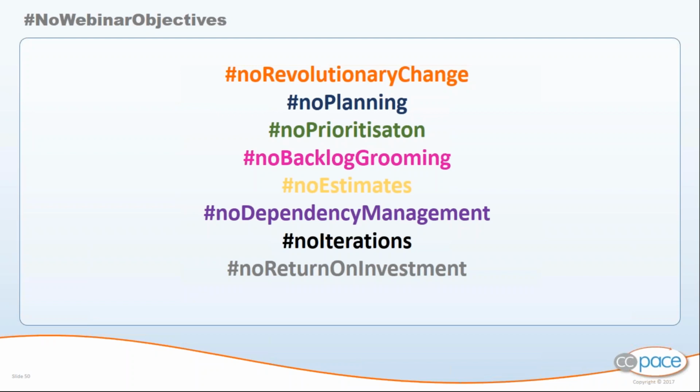Well, the surprise is that on a project that takes 3 years with 80,000 tasks, the variance between the planned value and the actual value will tend to be 0 because of the sheer numbers of estimates and actual values. But mind you, we may have missed on all of the activities. But when you do the sum at the end of 3 years, the variance comes to 0. Now you translate that into a 4-week iteration. There's no way that the sum of your variances on 30 tasks is going to tend towards 0.